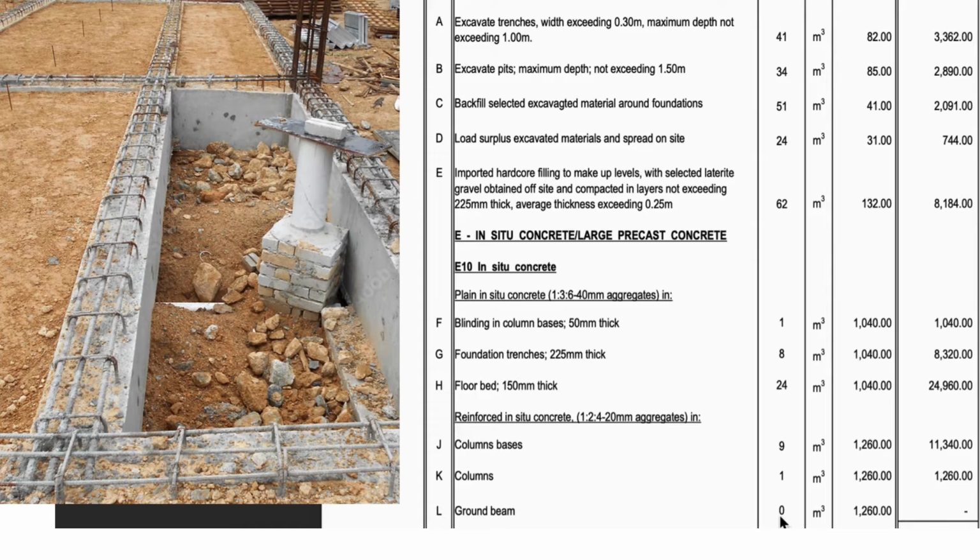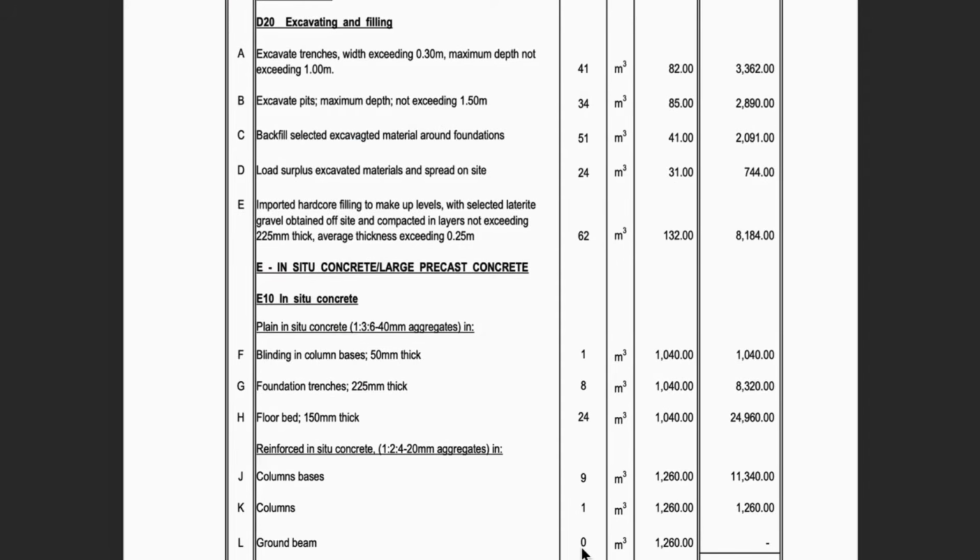After the concrete filling and everything, there is a formwork, which is just mostly wooden molds for the concrete. So there is a formwork for the edges of the foundation. There is also the formwork for the column sides, right? So wooden panels. Sometimes it's metal, if you can have metal, and as you are doing multiple projects, it makes sense.